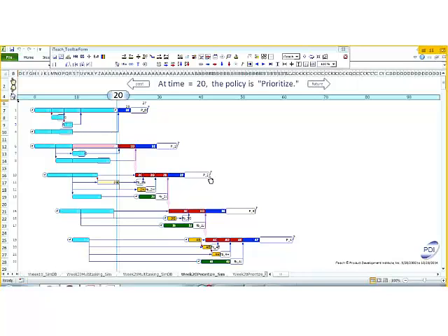So we want to use the yellow and green resources to see if there's anything they can do to assist with projects 1 and 2. If there's nothing they can do, they can work on preparations for projects 2, 3, and 4. Make sure that we have a so-called full kit, everything we need, so that once that project gets going, it starts at a full level of effort.